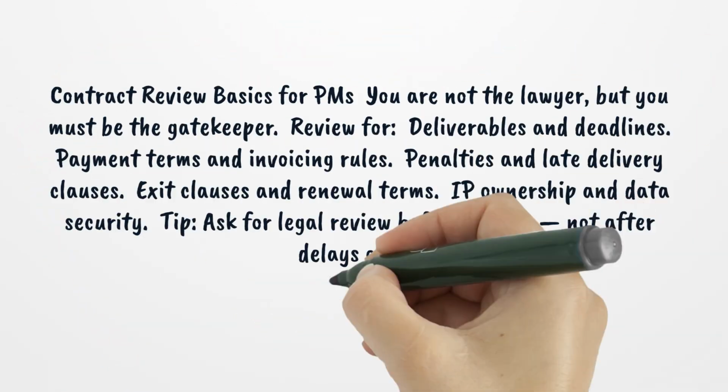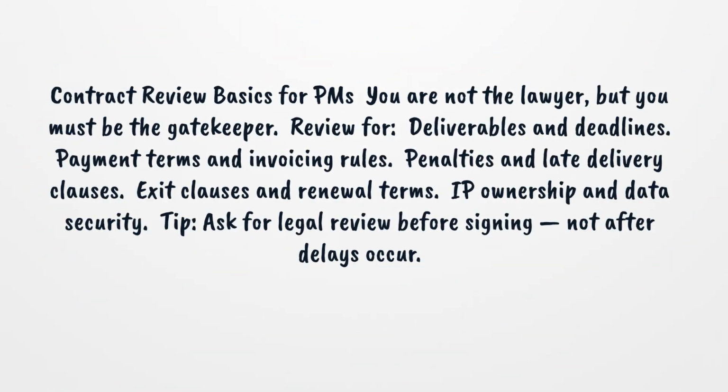3. Contract review basics for PMs. You are not the lawyer, but you must be the gatekeeper. Review deliverables and deadlines, payment terms and invoicing rules, penalties and late delivery clauses, exit clauses and renewal terms, IP ownership and data security. Tip: ask for legal review before signing, not after delays occur.